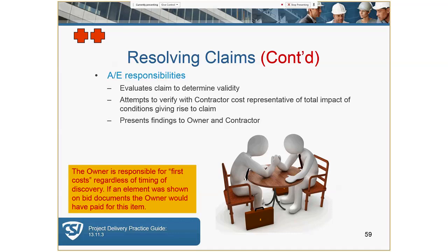So what does that mean? If a door needs a specific set of hardware to meet code, say a closure, and this wasn't included in the hardware schedule, maybe the wall was rated, but the door wasn't identified as a rated door, and the door hardware supplier and the GC had no way of knowing the door closure was needed to be provided, then the GC is clearly entitled to a change, as the item needed was not inferable from the document. But the owner may want the AE to pay for that closure.